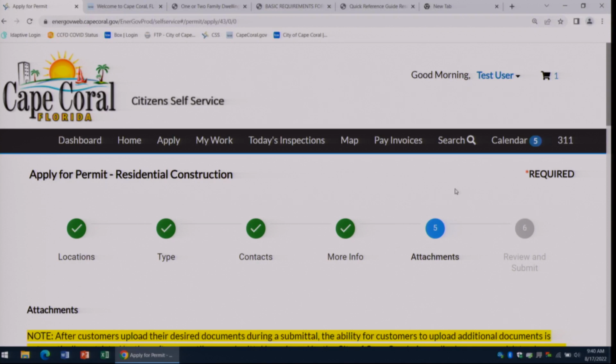So once it gets to the permit coordinators, they've adjusted all of your fees. They've made sure all the reviews are complete. They also update all the inspections on your single-family homes. Then they will put a note in the description of your permit that says the permit is released. Then it comes back to the permitting CSRs, and we finally issue your permit.